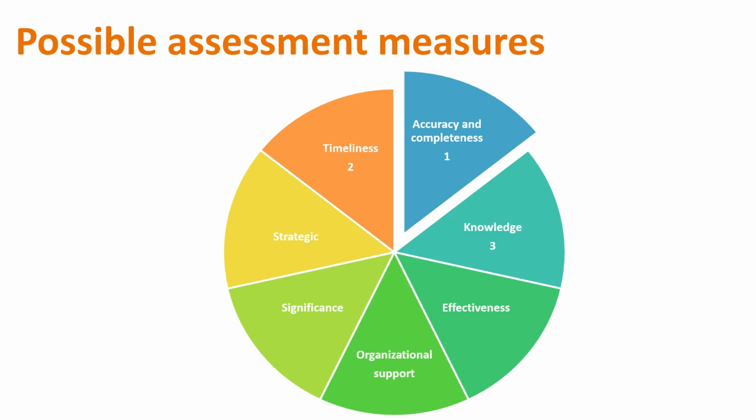A lot of people measure timeliness, but if you're engaging the BA well and you're doing it the right way and you're engaging them when you should, we're often brought in when we don't know what we don't know, and it's extremely chaotic. And I went through a multi-day estimation class, and I'll get into that later when I teach you some techniques, but estimating business analysis is hard because estimating implies awareness and knowledge, and I'm making an educated guess on something based on that. I ask for investment. I say, you know what, especially early on, give me a couple of weeks of investigating this, and then I'll be able to give you a much better picture.